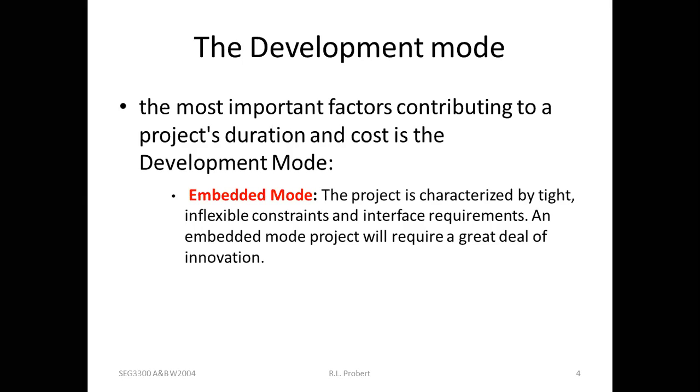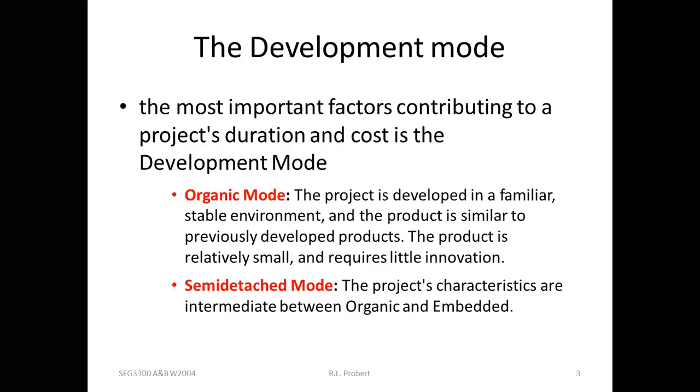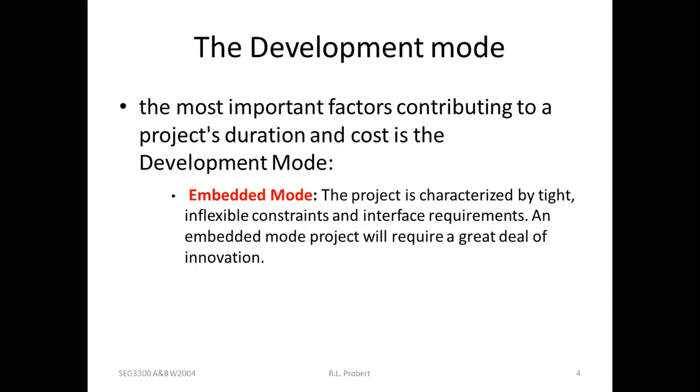If there is a project we have already done and we are developing the same kind of project, we can have the organic mode. And if that project is something mixed between the organic and embedded, we can have semi-detached mode. So first, while finding the effort and time, we need to see whether the project is organic, embedded or semi-detached. We need to find the development mode.